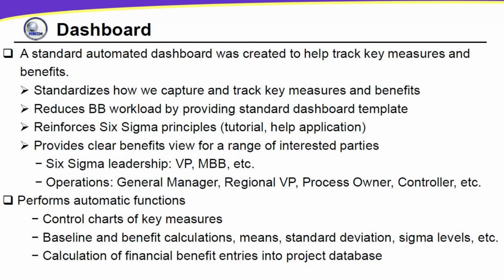And finally, the project must be closed with some financial benefits calculated, which could be hard or soft savings. At this stage, to even replicate the solutions throughout the organization, there may be some expenditure as well, which has to be included in the calculations. Timing plan, anything else that needs to be covered, especially on how long the handover is going to take, and JDI activities and a summary. So that's the end of the series of 5 phases.